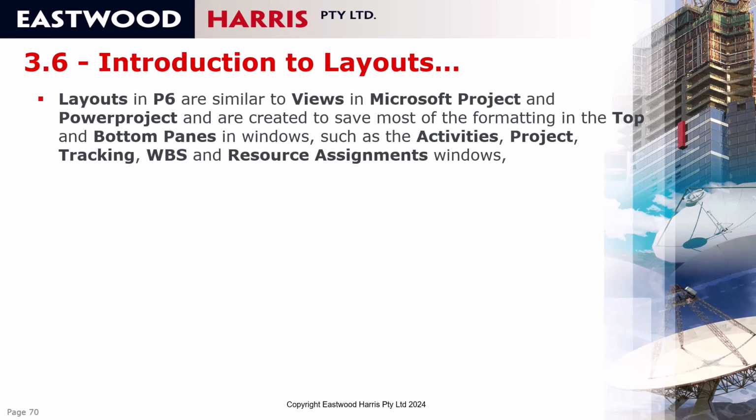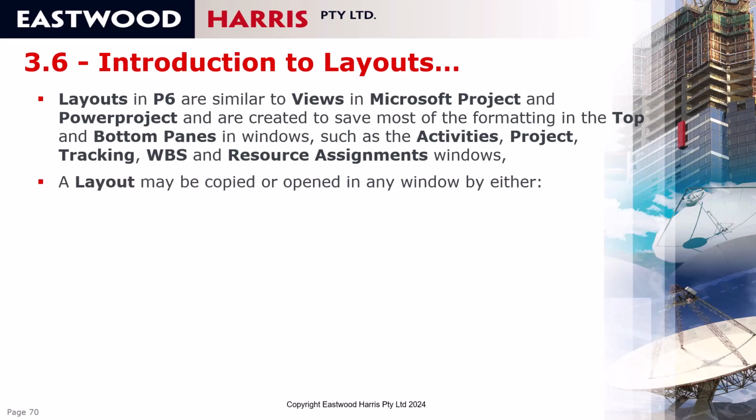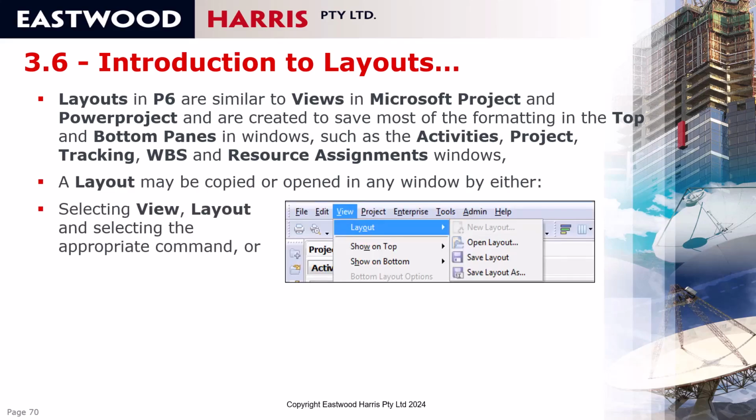Introduction to layouts. Layouts in P6 are similar to views in Microsoft Project and in Electrosoft Power Project and are created to save most of the formatting in the top and bottom panes in windows such as the Activities window, Projects window, Tracking windows, WPS and Resource Assignments windows. A layout may be copied and opened in any window by selecting View Layout and selecting the appropriate command.